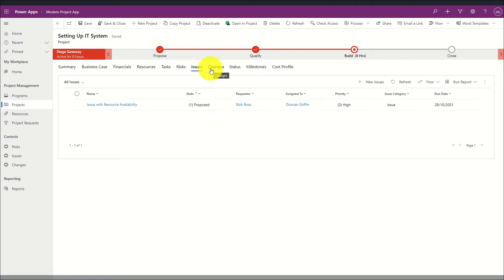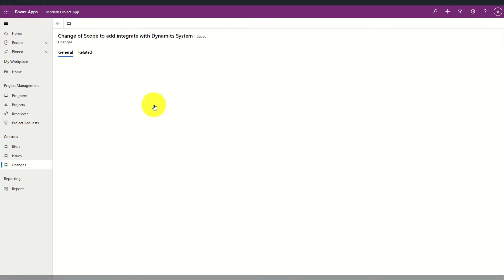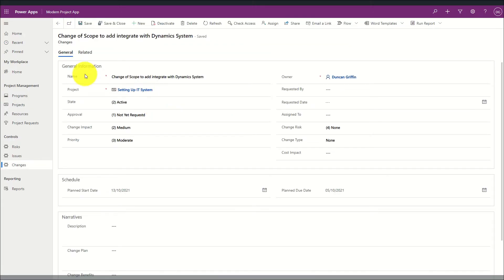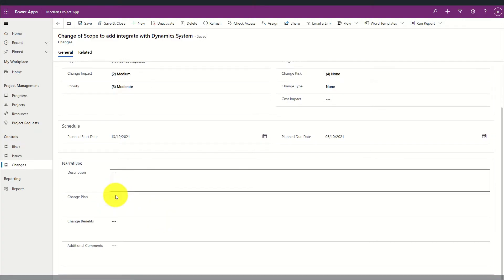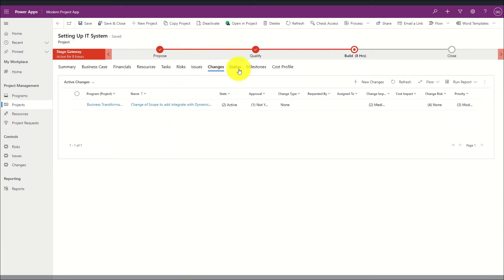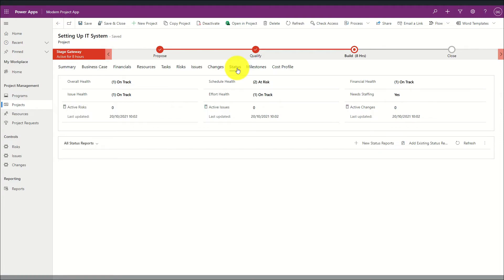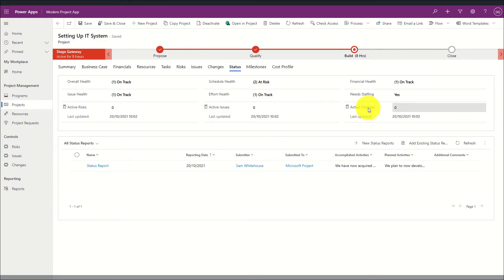We can also define a custom change log where changes can be tracked and managed against the project. By clicking on a change record I can see a general summary of the change, a planned start and planned finish date, and a narrative about what the change is and the benefits it will provide. Within this system there is also a status log where a summary of the health of the project can be added and updated, as well as rolling-up summaries of active risks, issues, and changes. In addition, a custom status report can be defined.